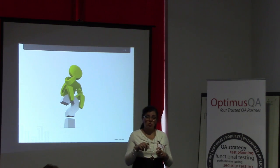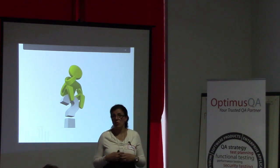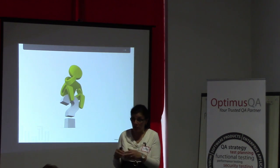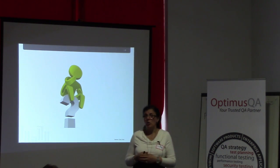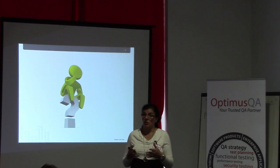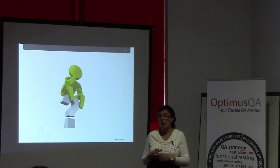I do adjust also support hours. So for example, this upcoming month, we're going to be short on support for about 150 hours. But that gives development the idea that they shouldn't push as many changes because we can't move as much. We can't do that many. So it's a good communication tool, I think. It helps people to understand what the workload is and what it is that we are focusing on. And it also gives us the opportunity to understand where the priorities are.